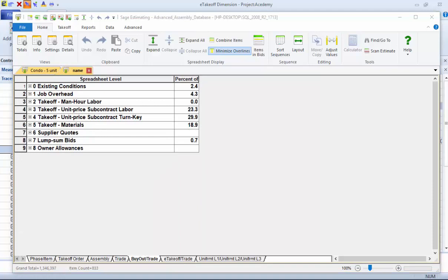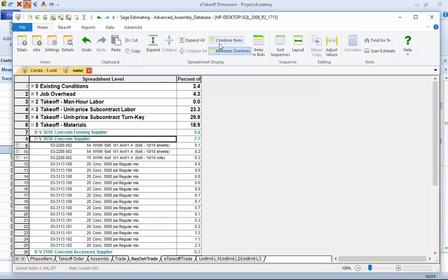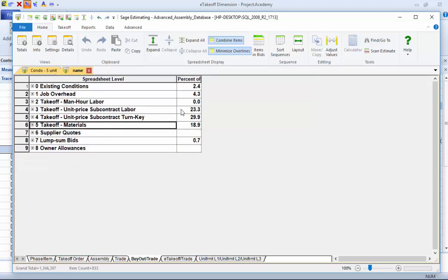But my favorite layout is buyout. To me, it offers the most bang for the buck. It's easy to review, becomes part of the actual buyout process, and is an easy way to see how much of the estimate was estimated. In this case, over 90% was estimated, and only 4% came from bids. Ideally, it would be the other way around. This layout is helpful to prepare RFPs, compare trade bids against the estimate, write trade contracts, and write purchase orders.